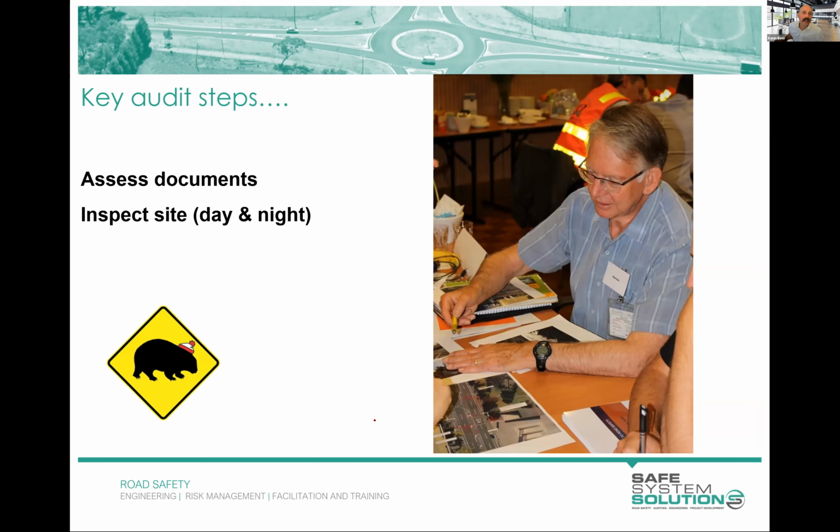So then you have a look at the documents. And as I mentioned, if you're doing a detailed design stage audit, you might get hundreds of pages of design reports, different documents and the like, and you spend your time wading through that. You might apportion it out to people with expertise in different areas, but everybody's getting a feel for it. And you inspect the site, and you go there during the daytime and the nighttime.